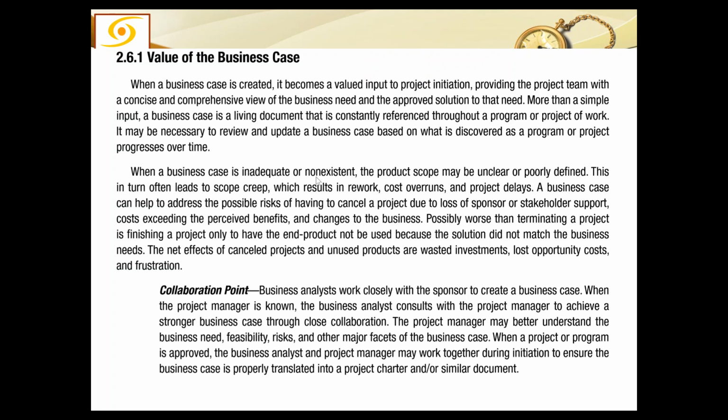When a business case is inadequate or non-existent, product scope may be unclear or poorly defined. आपने देखा प्रोडक्ट का स्कोप ही सही डिफाइन नहीं हो सकेगा। This in turn often leads to scope creep, which results in rework, cost overrun, and project delays.